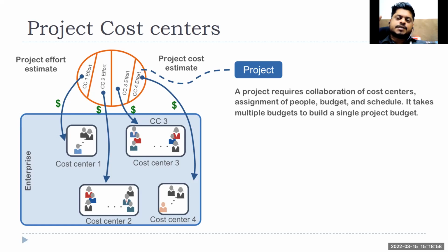So that is where the cost center concept comes into the picture. Whenever I have a project, it is not necessary that it will be charged to a single account, right? Depending upon the work, depending upon the teams who will get the benefit of that project, it should be charged to multiple accounts. Depending upon my effort, say the effort I put into a sales and distribution module, that will be charged to the sales and distribution account. So different cost centers will be there. Some part obviously will be for the CEO for this kind of project. The balance amount will be charged to that.